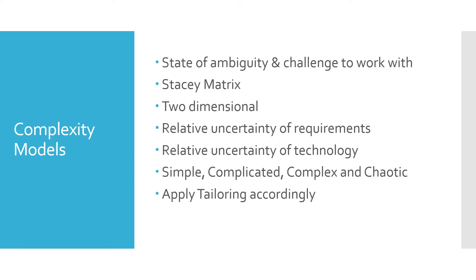The second complexity model is the Stacey Matrix. It is a two-dimensional matrix: one axis relates to uncertainty of requirements, the other to uncertainty of technology. If both are certain, it is simple. If requirements are unknown and technology is certain, it is complicated. If requirements are uncertain and technology is certain, it becomes complex. If both are uncertain, it is chaotic. Based on whether a situation is simple, complicated, complex, or chaotic, a project leader can apply tailored development approaches, risk models, and methods accordingly.